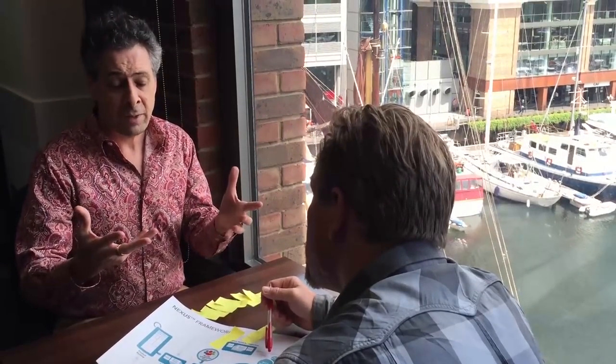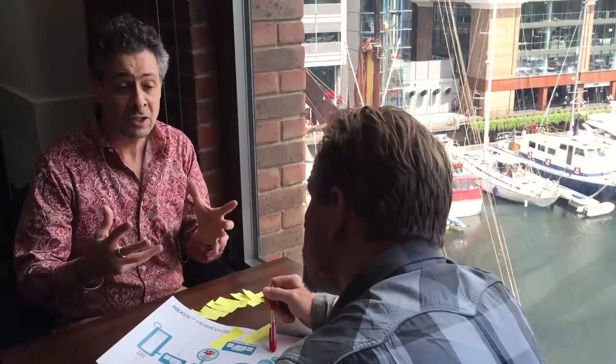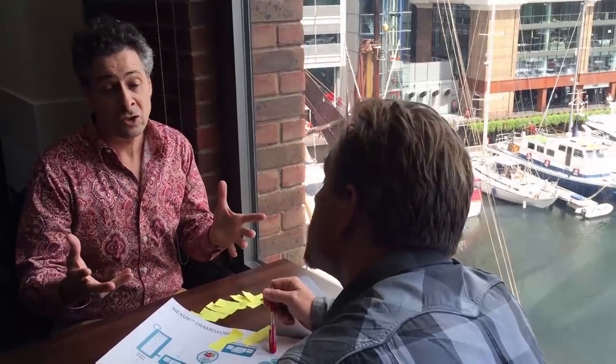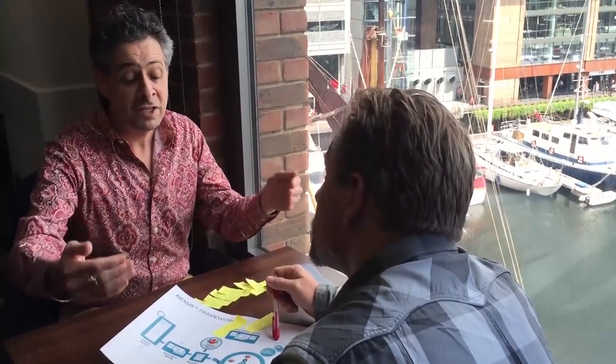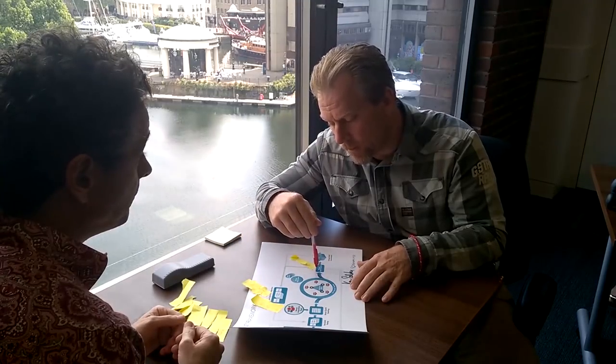To really raise the transparency of integration issues that are happening every single day. So every day, representatives get together, look at integration challenges, and then that information feeds into each team's individual daily Scrum. And we're almost there.